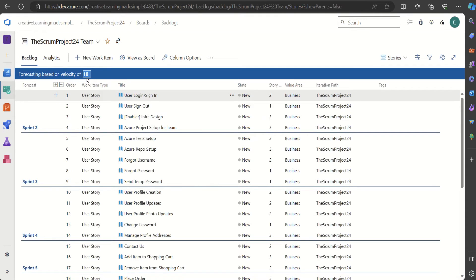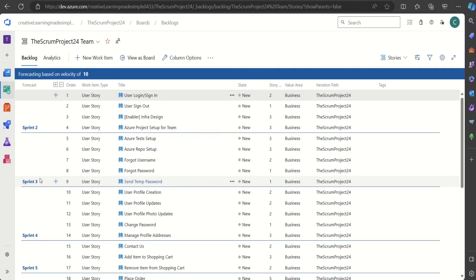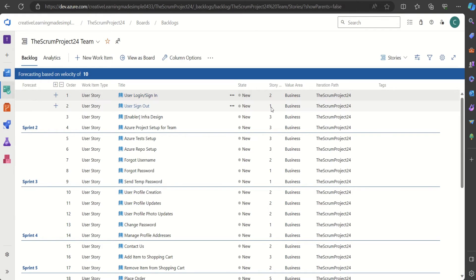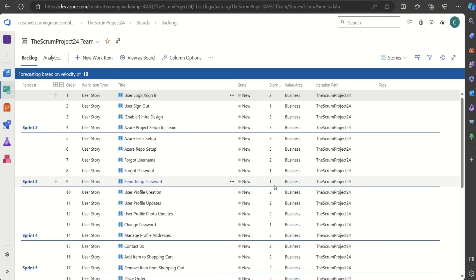With velocity set to 10, the feature tells us which user stories can be completed in Sprint 2, and which in Sprint 3. For Sprint 2, the calculation is: 2+1=3, 3+3=6, 6+3=9, which is approximately close to the velocity of 10. For Sprint 3, it shows 3+3=6, 6+2=8, 8+1=9, and then 9+1=10.